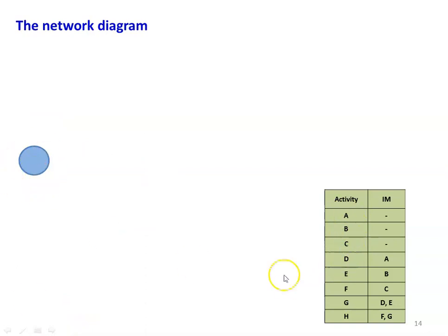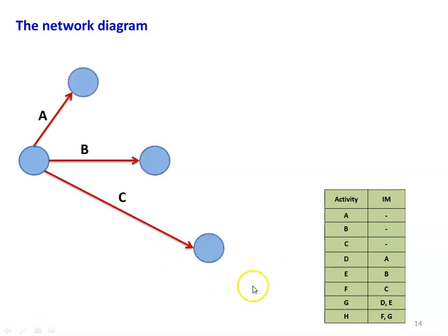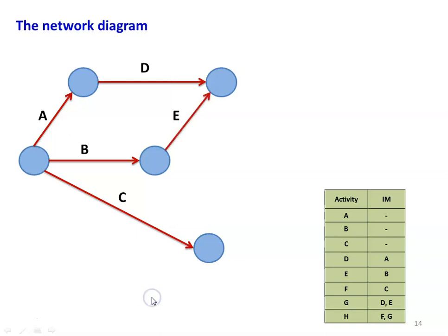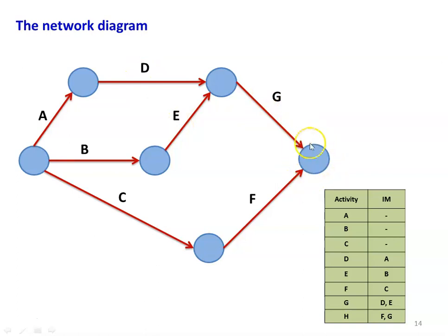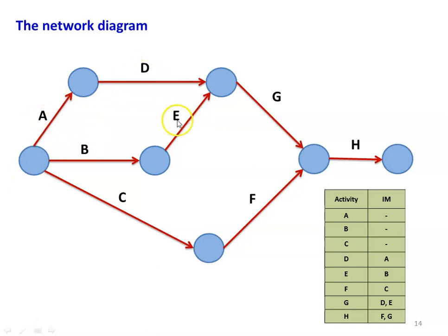Drawing the network for this example: activities A, B, C independently emerge from the initial event. D starts after A; E after B; F after C. G starts after completion of D and E, so D and E converge at one event before G begins. H starts after F and G, with F and G converging at a single event before H. This gives us the complete network diagram with one initial event and one final event.